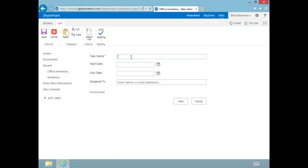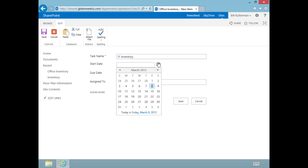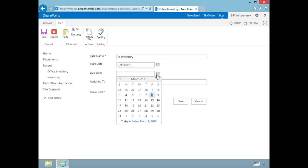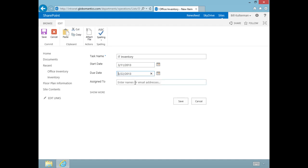We could add it here or go up to our ribbon, click on the Tasks tab, and add new item this way. This one is going to be the IT Inventory. We'll start next Monday and continue until the 22nd, and we're going to assign this one to Angelo Haley.